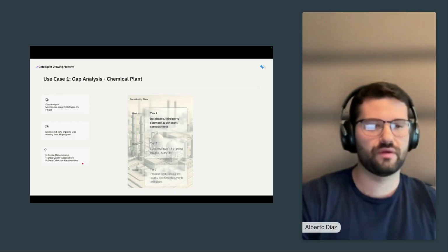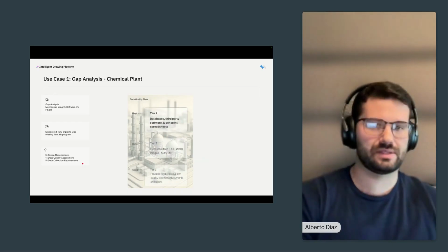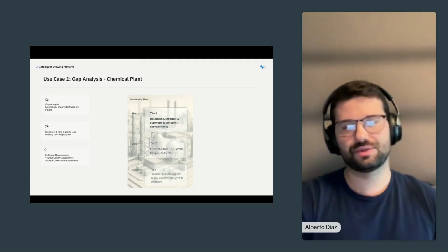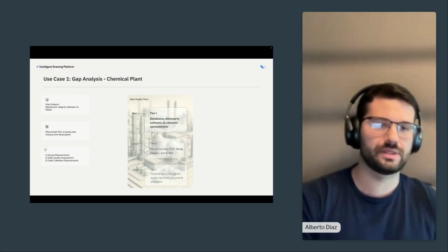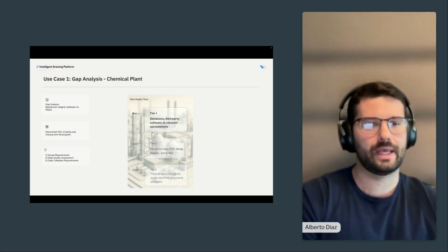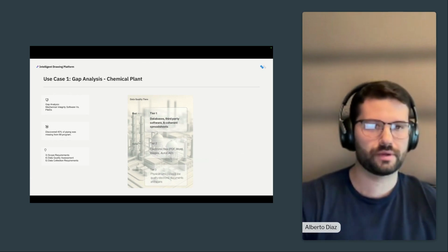And tied with the first two, obviously the data collection requirements are heavily tied to the number of assets that you're going to be implementing. So having an accurate number that is derived from existing piping and instrumentation diagrams is often critical to glean this information and have conclusive numbers prior to the execution of the work.